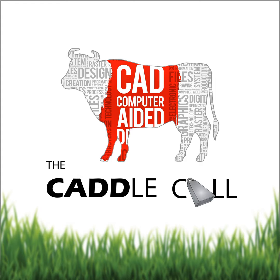So, Revu allows you to build these custom properties, and you can use drop-down lists so that people get choice boxes. You can put in text boxes so they can type in values or numbers or costs or prices. You can even build formulas to handle all the data and pricing info that you need and have it automatically calculate and update those values in real time as your measurements or your takeoffs are changing. This is not programming. This is really configuring the software. It's absolutely all it is. It is strictly configuration. There's no coding required for this.